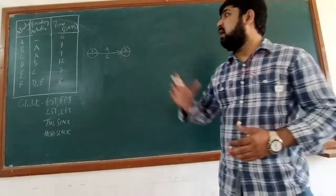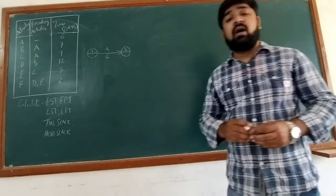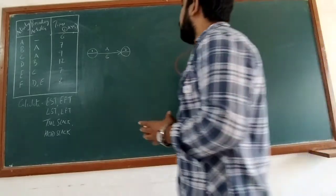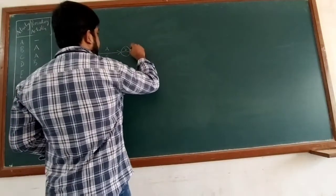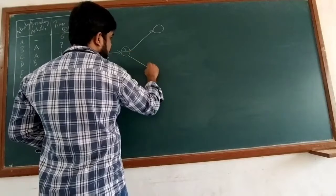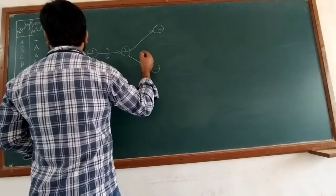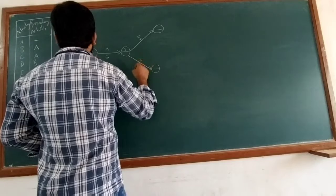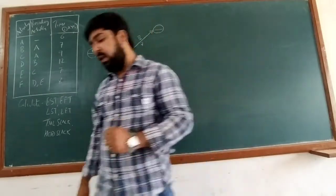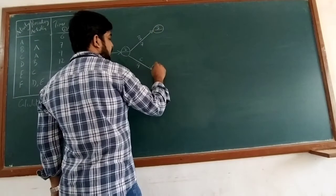The next activities are B and C. Both have a common preceding activity, which is activity A. So we will construct both activities from activity A's ending node. Activity B requires 7 days to complete and activity C requires 9 days to complete. We number their ending nodes as 3 and 4 respectively.